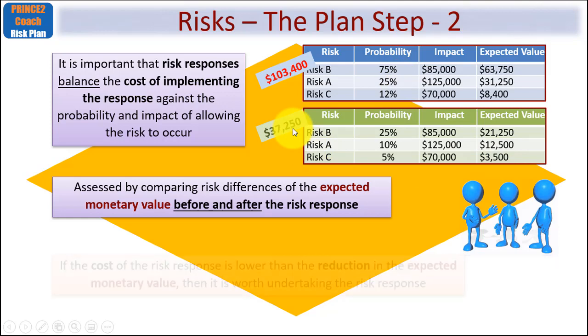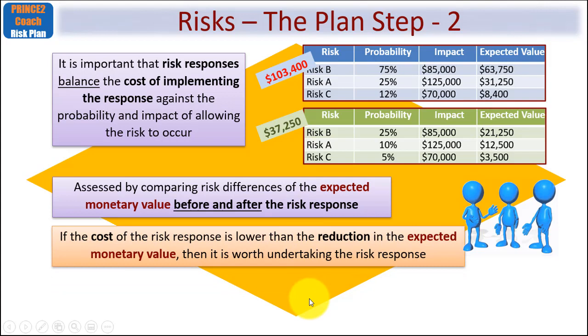So it's sensible that if the cost of the risk response is lower than the reduction in the expected monetary value, that means it's worth undertaking and implementing the risk response. Fairly standard stuff, I'm sure you'll agree.